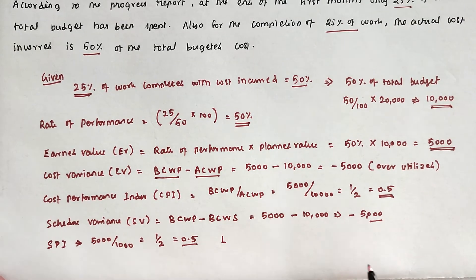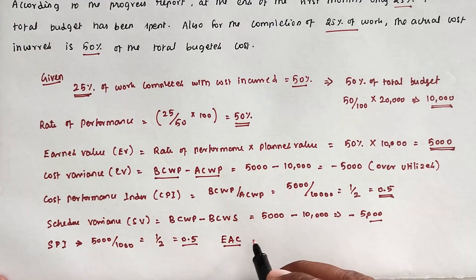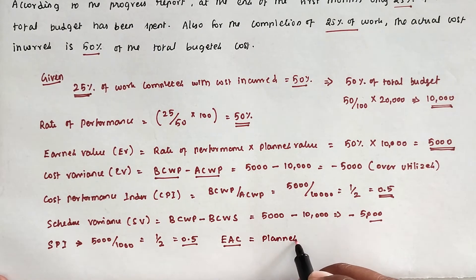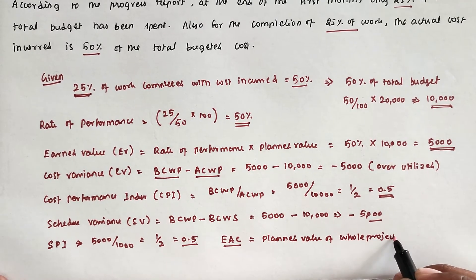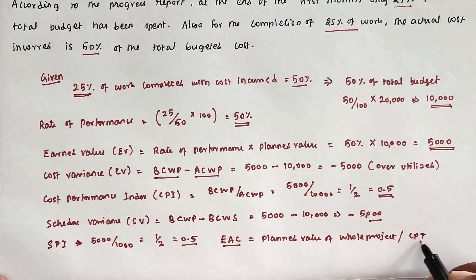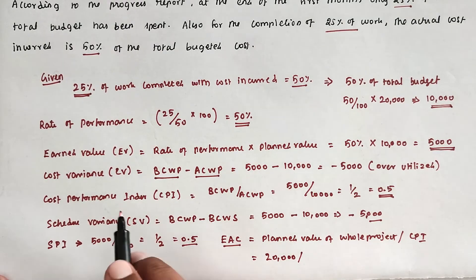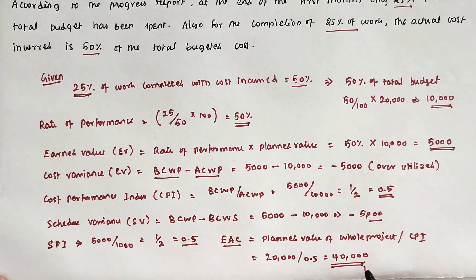Next is the Estimated Completion Cost. This is calculated as the Planned Value of the whole project divided by CPI = 20,000 divided by 0.5 = 40,000. So to complete the project, we would have to spend 40,000 because of low performance.